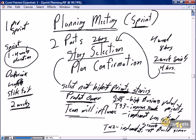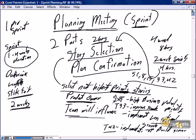So we spend two hours doing story selection in hand with the product owner. At that point we typically tell the product owner they may be excused — it's not mandatory they leave, but the next step is plan confirmation. We have selected stories 1, 8, 15, 33, and 42. On first blush, we think all of those will fit within our ability to deliver for a sprint. In the second two hours, the team confirms the expected effort for each story and gains commitment that they will be able to complete all of these stories.